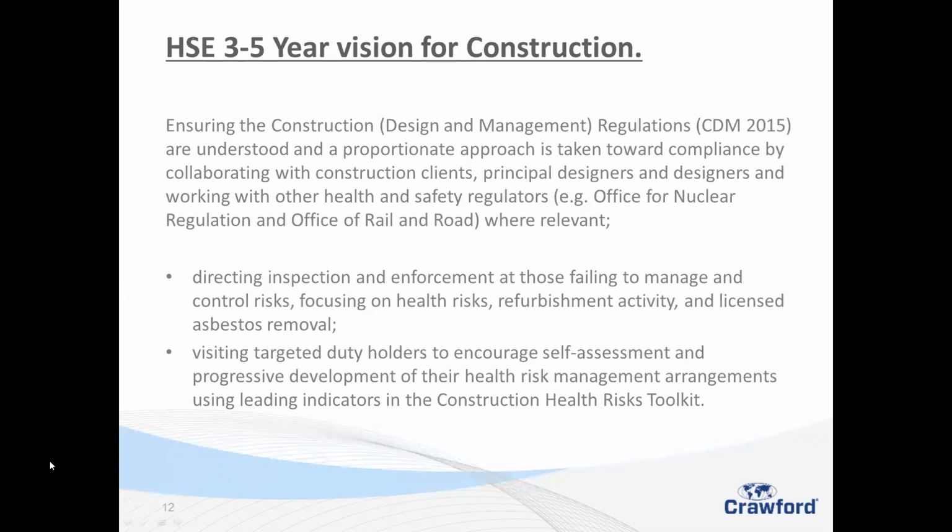Okay. Someone has asked here, who has overall responsibility for managing the health and safety of the site during construction? Both the PD and the PC. Because it's the principal contractor's site, they have the ultimate responsibility. PD's there to give them the structure and tell them what to do. On all of our sites where we use this PD, I monitor the construction phase plans to ensure that they meet our requirements and legislation, and we support the contractors to do so.